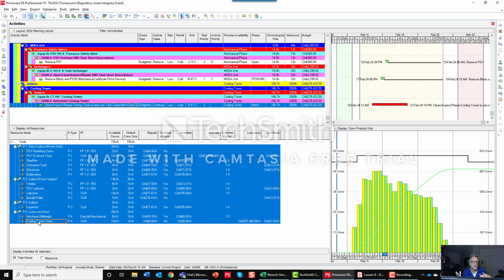What it actually costs me in dollars, so actual is dollars, earned is percent complete. What it actually costs me from the timesheet will always be equal, less or more than what I had planned. And that's what's going to calculate my tool time. So I need the timesheet data on a day-to-day basis from contractors or from employees to be able to calculate that.